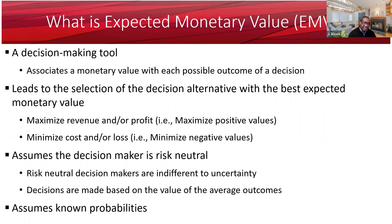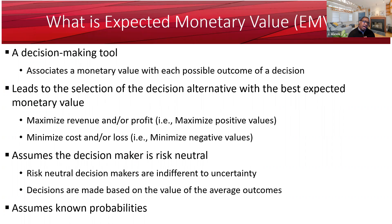There are certain assumptions behind the application of EMV. EMV assumes that the decision-maker is risk-neutral. Risk-neutral decision-makers are indifferent to risk — meaning they are neither risk-averse nor risk-seeking. Decisions are made based on the value of the average outcome. Another assumption behind expected monetary value is that you know the probability associated with each possible outcome.